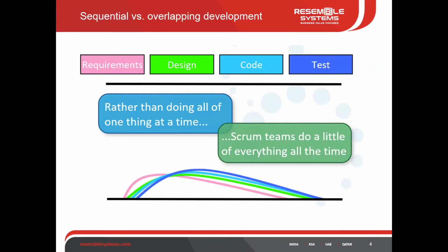So I'd be following a schedule to execute this in maybe the coming 6 months: 2 months for the requirement, another 1 month for design, 3 months for coding. So I'm doing a waterfall methodology, and at the end, if there are any changes or if something happens, the application should be rewritten again, or it can be cancelled.